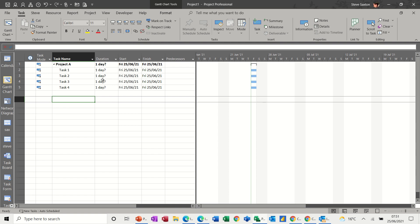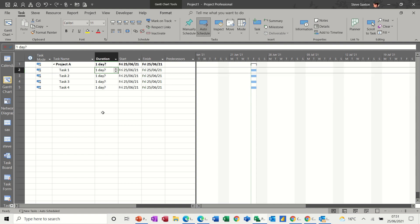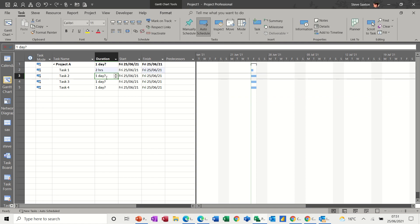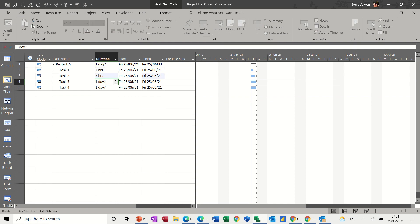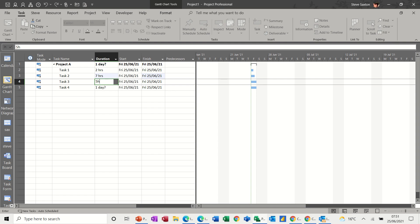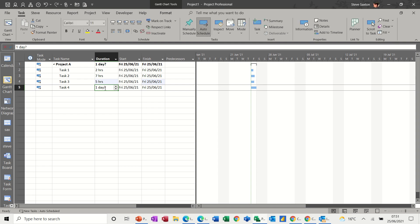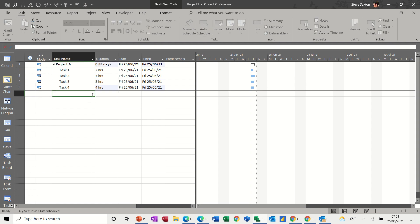So first of all, let's put some times on these tasks. So if I put two hours, seven hours, etc. All you have to do is just put H or HR, five hours, and it will just do it in hours for you, four hours. And then you can see the bars have come down.